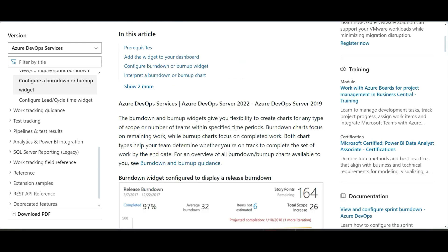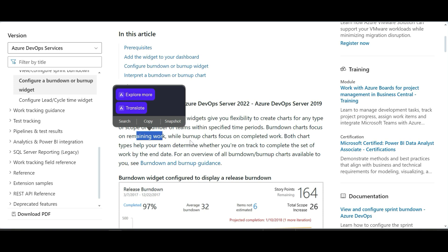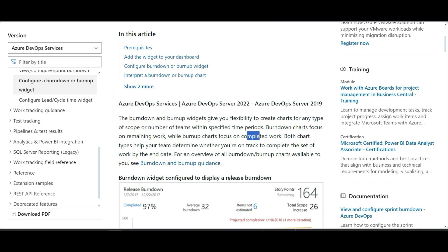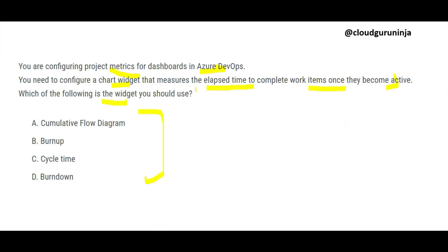Burn down and burn up charts focus on work status. Burn down shows remaining work — what is still left. Burn up shows completed work — what tasks are done. In this question, they reference burn up, but we do not want to understand which tasks are complete; we want to understand the time taken to complete that work.